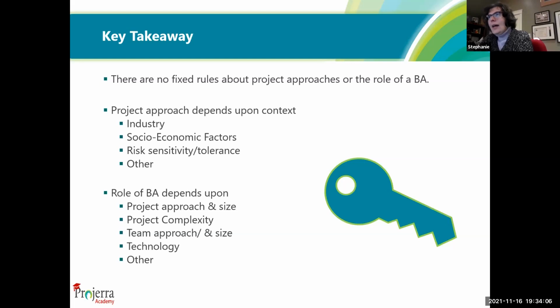Yeah. Well, I guess my question would be, how often is there extra work, and are you taking enough work into your sprint to begin with? Maybe you need to take a few more stories. What we did when I was at Global Affairs is we said, okay, this is the key set of features that we want to do, and we're going to take one or two extra that are gravy. They're not officially part of the sprint, but if there's extra capacity, you can work on those ones.